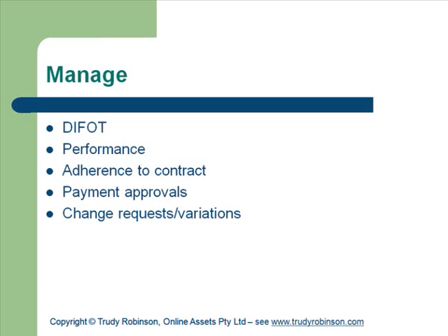Yeah. Contract variation or change variation can be as simple as that. It can be a pre-printed form that you fill in, both parties sign, then you go off and do the work. And your assessment requirements will need you to cover something like that. There happens to be a form in the templates and forms page, but it's up to you what you use.